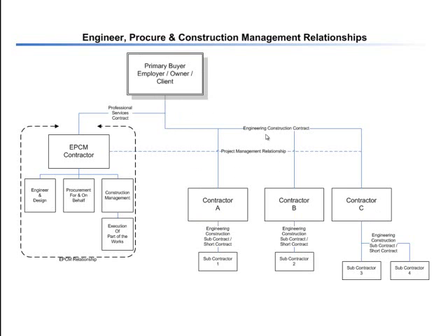And when I say you need to indicate the relationships, these are the relationships. So on the lines you can just draw or write in, I used Visio to create this. You can just draw in the types of contracts that you're going to use. So in this case, this was a specific type of contract, a new engineering contract, and this one used the engineering construction contract, or the ECC. But over there you can see there's a different type of contractual relationship, and that's called the professional services contract, or the PSC. Alright, and that's basically what you need to do for that question.